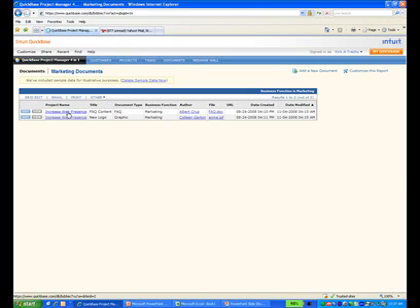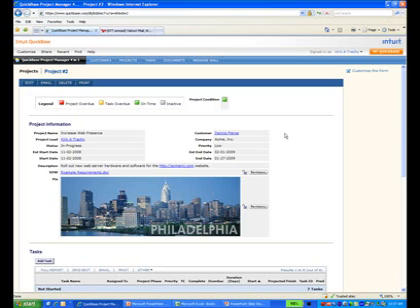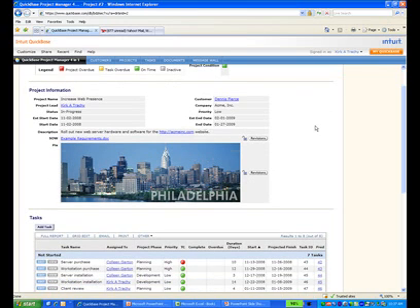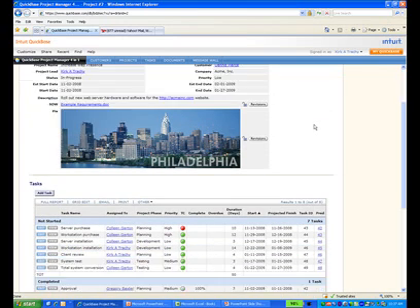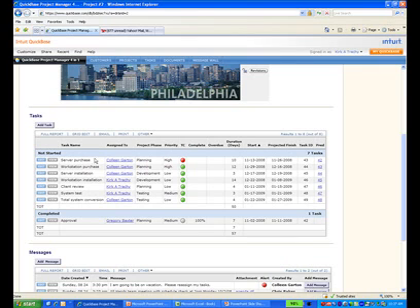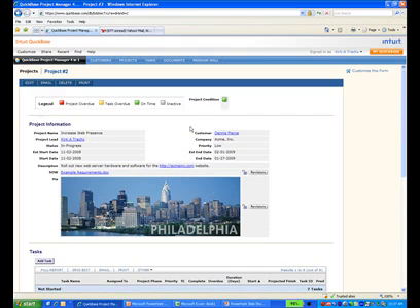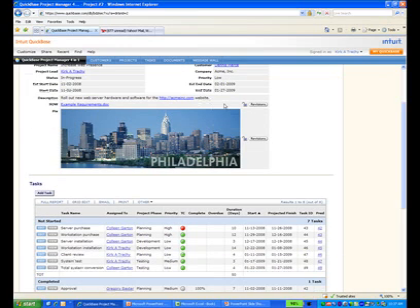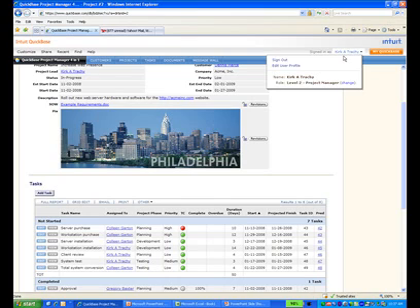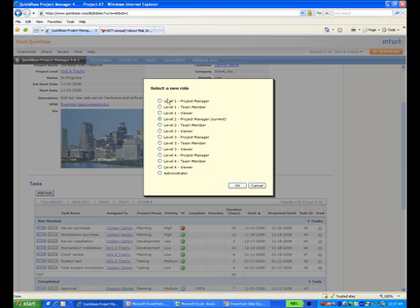Let's go back to the project. Something here that strikes me is we have no budgeting, we have no time cards. Notice that the assignments are assigned to people, and there's only days that are given. Some of these, the task condition is exposed here, or there's one of them that's overdue, but it hasn't affected the overall project condition here yet. So, what if we want to keep track of budgets and time cards? Well, we just outgrew this level 2, and now it's time to move to level 3.